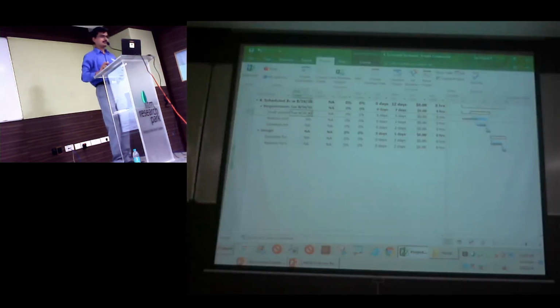So I'll just take a look at this plan. In this plan, everything is very sequential. So float is naturally 0 for everything. Okay. The bad part in backward planning is everything will be critical, because every task is scheduled as late as possible. So you don't have any float availability. That's the drawback there.